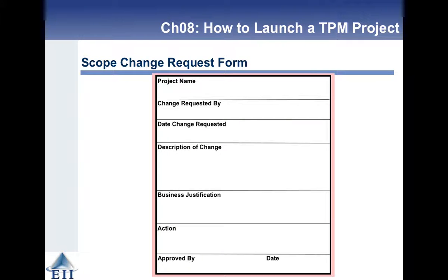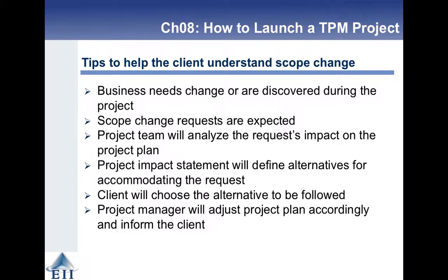And here's a sample change request form. And it's just some tips, because the client is often the one who is requesting the change, and they need to know what it's going to impact them. Is it going to cost them more? Is it going to delay them? What's the issue?